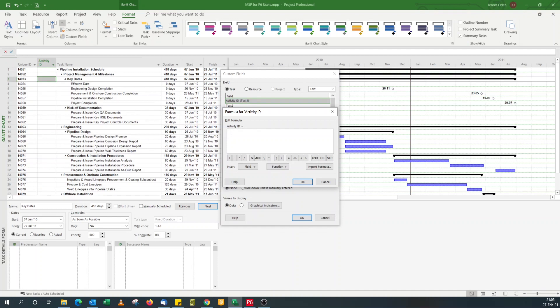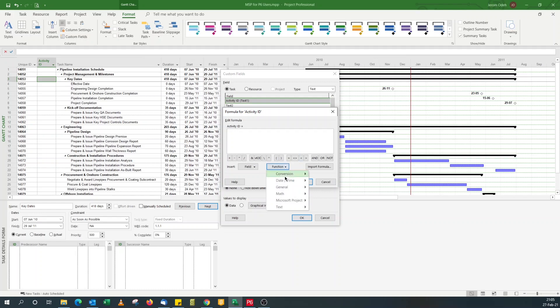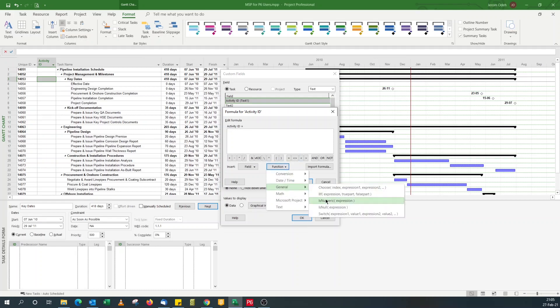But if you want more complex prefixes, like for engineering activity, you want to assign EN or ENG. For procurement activity, you want to assign PR or PRO. For milestones, you want to append ML or MIL. You can do that and you can use the if function to do this.